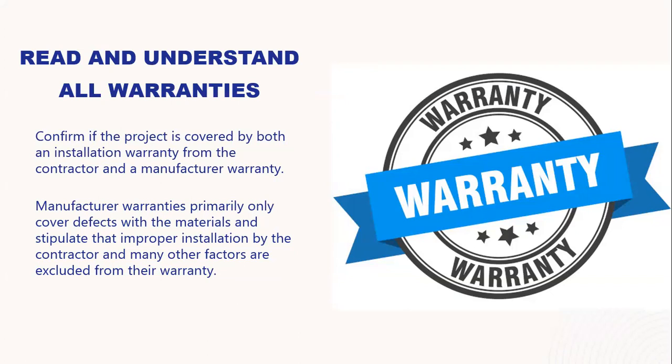The contractor warranty should have stipulations about the workmanship. And again, the length of those warranties is going to vary on the type of work being performed. Typically for small localized repairs, the warranty period isn't going to be as long as it would for a full replacement or other major projects.